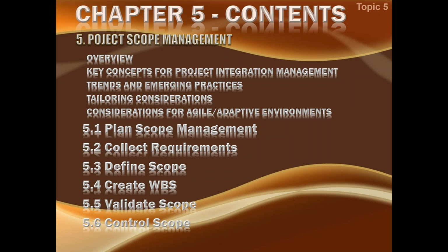Then when we move on to define scope, at that point requirements are no longer required to be identified, because whenever we need to collect the requirements again, we will come back to the process of collect requirements, and there we will require both the requirement management plan and the scope management plan. But for defining the scope, we will develop the scope statement, and here we do not need the requirement management plan anymore. So the scope management plan will be fine, and